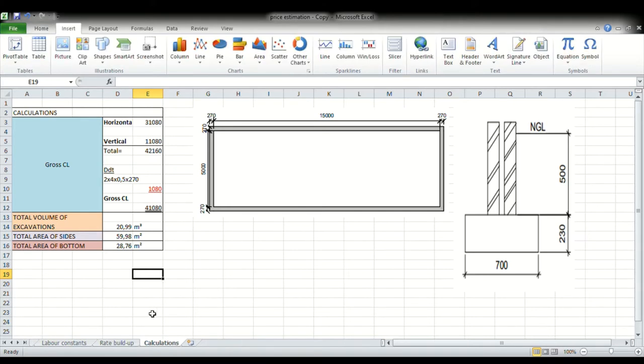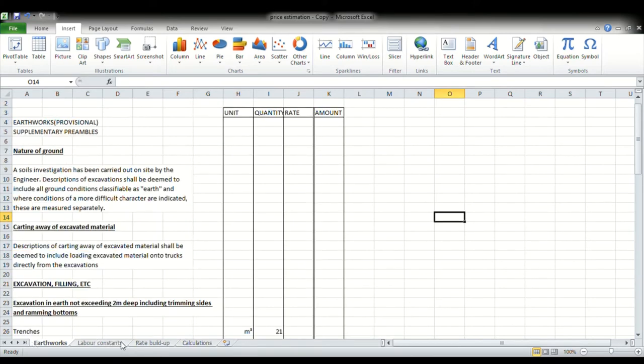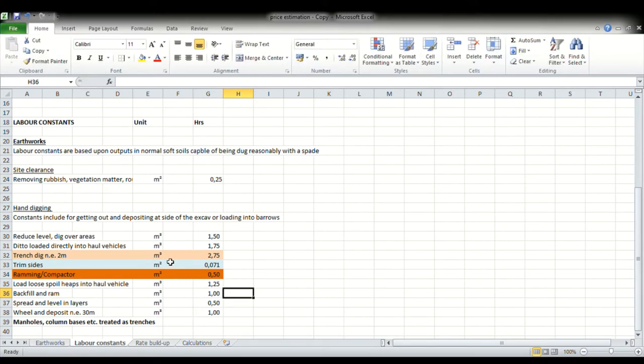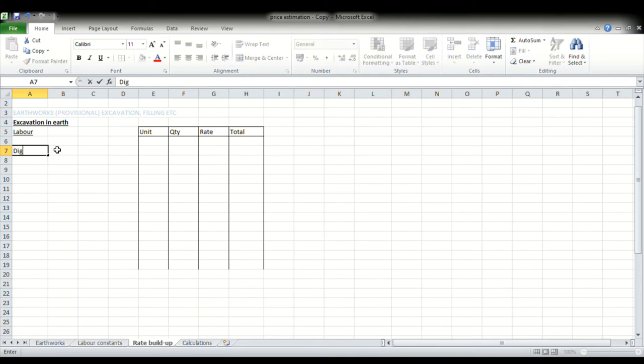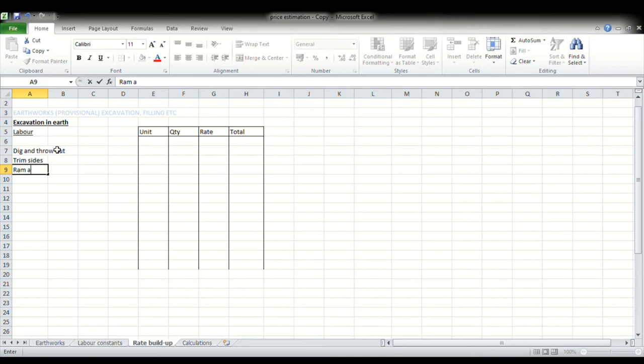Now the next thing that we need to do is have a look at our labor constants. So the labor constants we're going to use for our trench dig is 2.75. For trim sides, it's going to be 0.071. For ramming, it's going to be 0.50. And the labor constants that I will be using, I got from credible sources. I did not just make them up. So our trench dig, like I said, 2.75, 0.071, 0.50. I just want us to go to our rate buildup and to put these down. So our labor activities, right, we said we'll involve dig and throw out, and then we said trim sides, and then ram and level bottom.